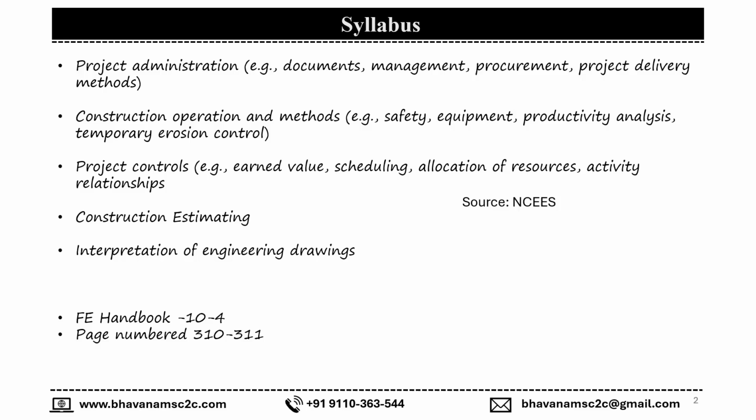It will give you the overall idea how the activity relationships have to be understood. And construction estimating, it is related to the cost aspect. So for this fundamentals of engineering exam, construction estimation will be very simple for you. The formulas for the construction estimation is nowhere given, but you will be given certain amount of quantity of work that has to be done on the site, and you will be given the unit price for that particular amount of work. Accordingly, you have to calculate it.